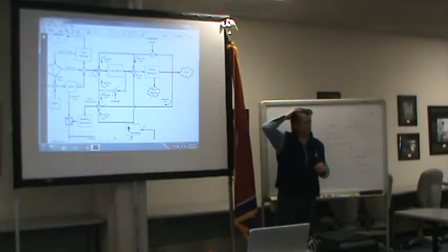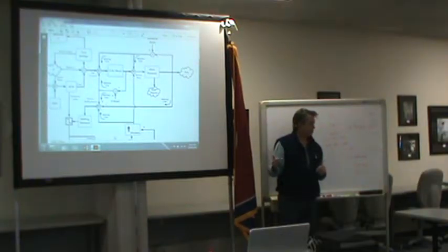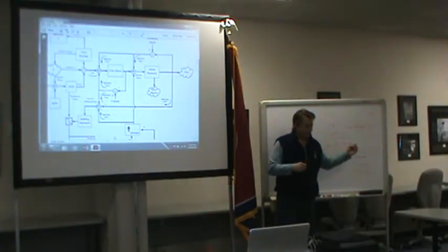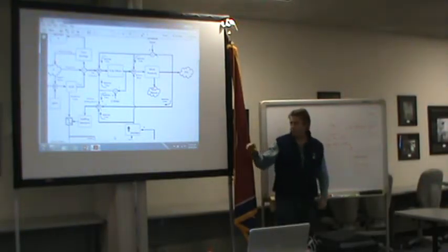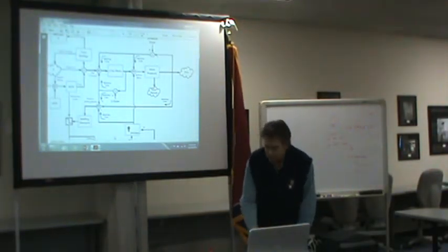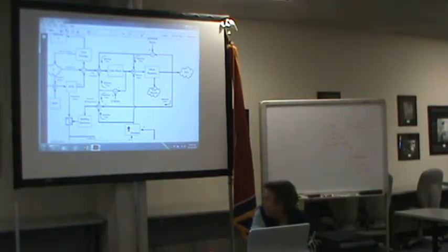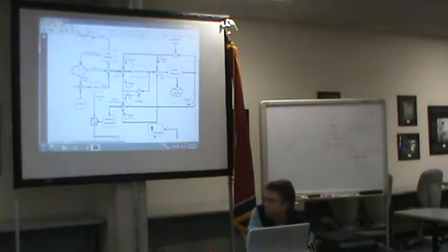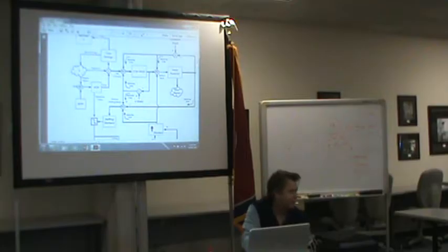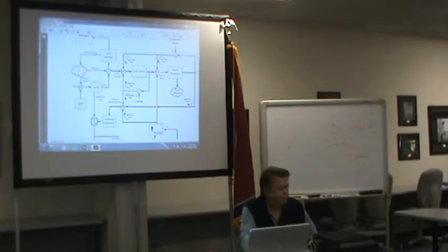But what we've seen before is the nonlinearity treatment. I think I'm going to do this, tweak this knob, and all of a sudden that doesn't happen. So go back to here for a second. I said that we told the government that we need only this many number of heads a priori, and we're now 3 years down the road, over here. That's the head count limit coming in here. But my basis of estimate, the way we've always done it in the past, says I need 10% more people. Now I've got to convince a customer that I need 10% more people. At the same time, I've already told them that I would need maybe 2% less than what I have. Okay?